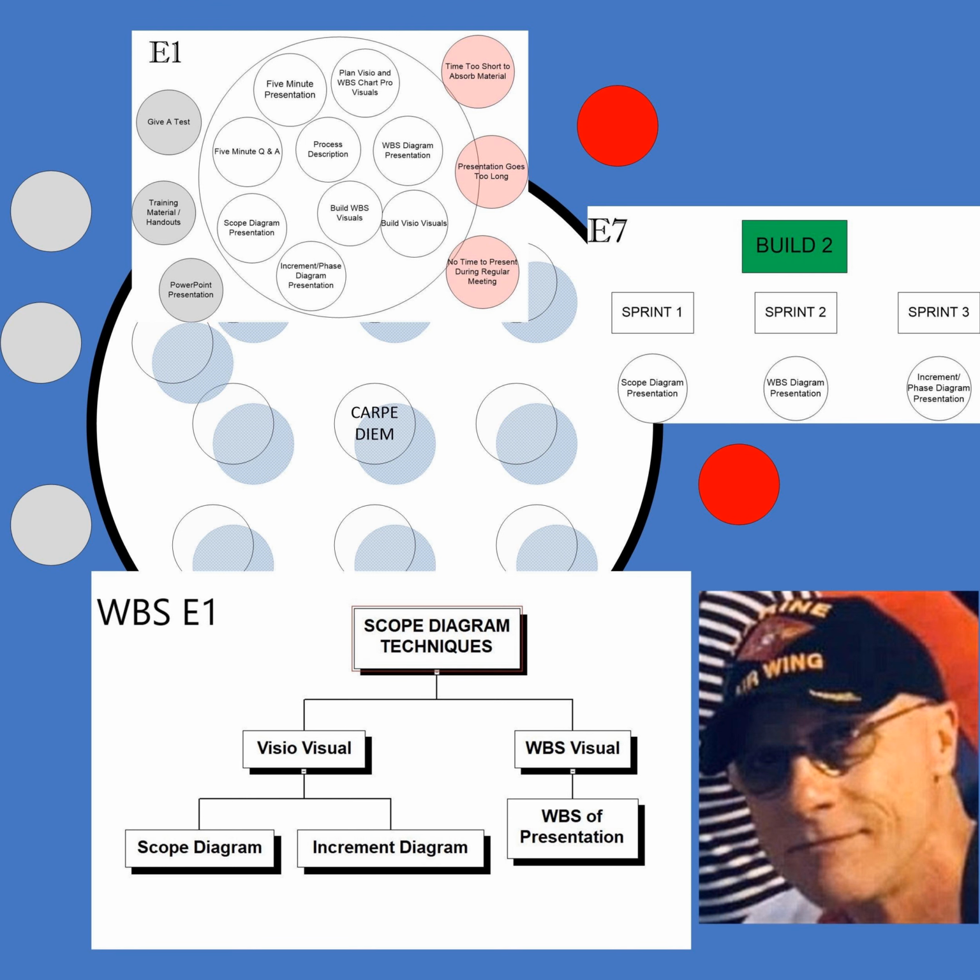Let's look at one. Each system vendor will be available at the destination to repair any system that has problems. The hosting and moving company has been tasked with coordinating this and is responsible to pay for repairs of any equipment that does not power up. All right. So if something broke during the move, the vendor took the responsibility and had folks there to fix it. The owner's warranty maintenance agreement that is currently in place will take over after the owner's sign-off that their equipment is operational at the destination. So we put the equipment in place, they turn it up, they check it, everything. Okay, so now their warranty's in place, so now the vendor is no longer responsible.